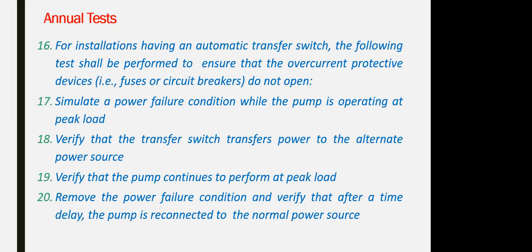In case you have an electrical pump, it is connected to emergency supply and has an auto transfer switch within the pump itself. We have to test that automatic position of the transfer switch by simulating electrical shortage of the power and assuring that the generator is operating and converting the automatic transfer switch to the standby supply. For simulating the power off, showing the transfer switch is working.